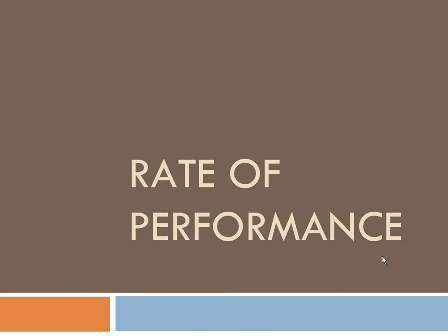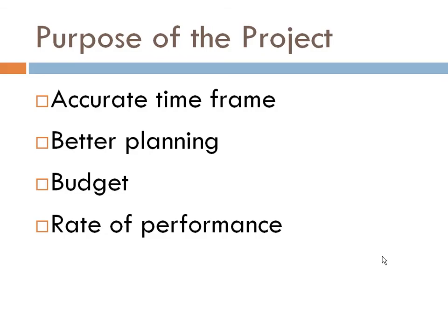The second half of this presentation looks at the rate of performance of a project, another important part of project management. The purpose of this rapid analysis is to look at the first few steps of a project once they have already been completed, compare their actual times to the originally estimated times, and then evaluate a more accurate time frame and plan for the remainder of the project.